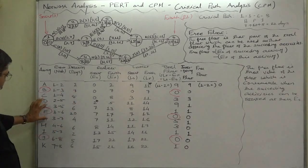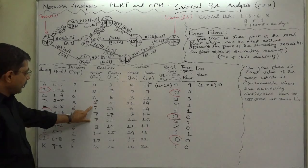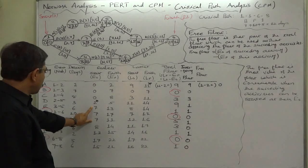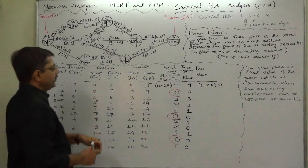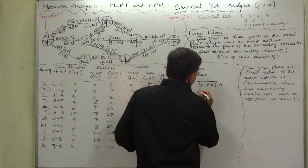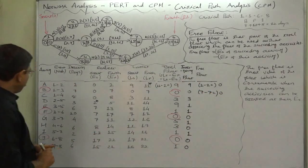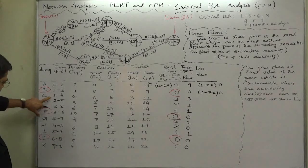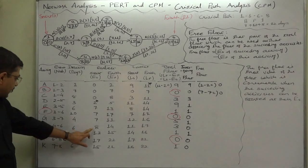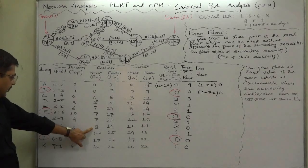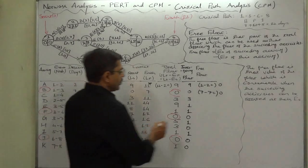In case of B, the succeeding activities are these 3 and their earliest start times are all 7, and the earliest finish time of B is also 7. So 7 minus 7 equals 0. In case of C, the succeeding activity at node 4 is H. The earliest start time of H is 8 and earliest finish time of C is 8, so 8 minus 8 equals 0.